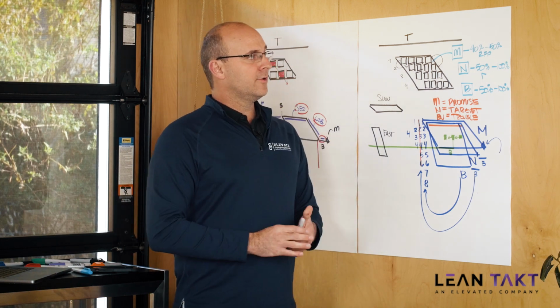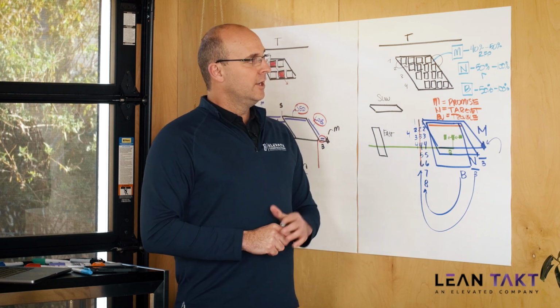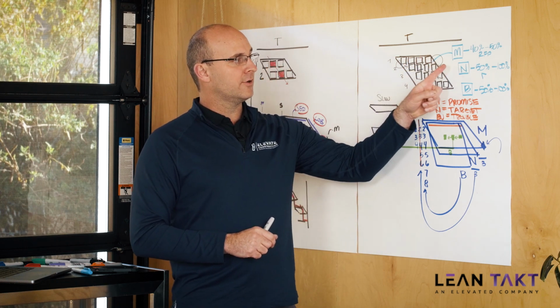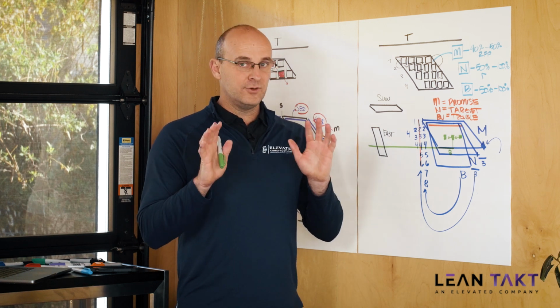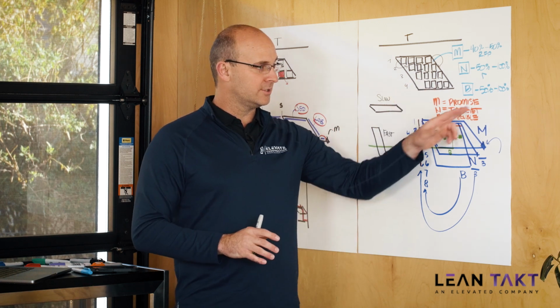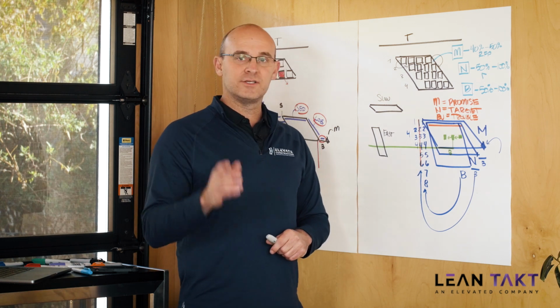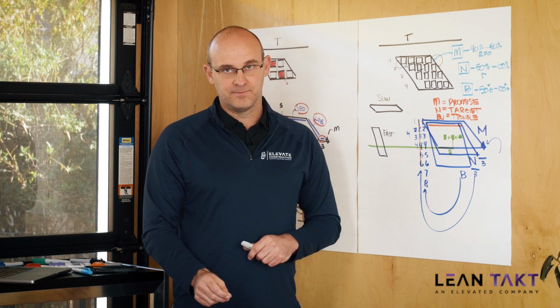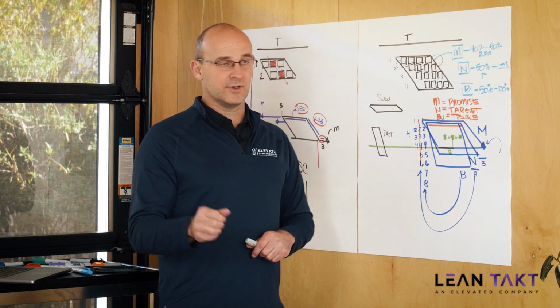So the realized flow potential is a formula that tells you between 0 and 100 how fast you're going. We always want to identify a macro, norm, and a backup. We want to make sure that you never get stuck, that you can always adjust your zoning strategy to go faster so that you can still finish at the end on time. These are not separate schedules. They're the same schedule going different speeds.